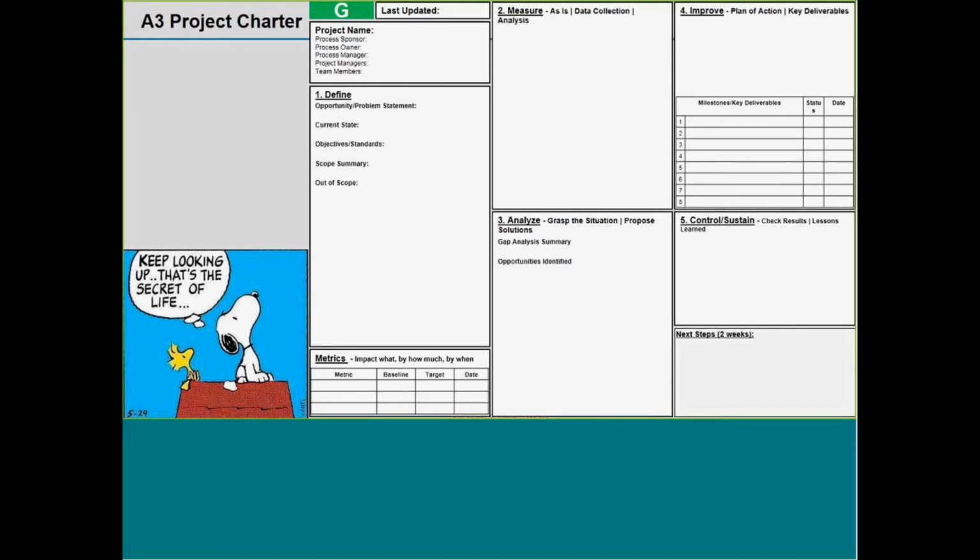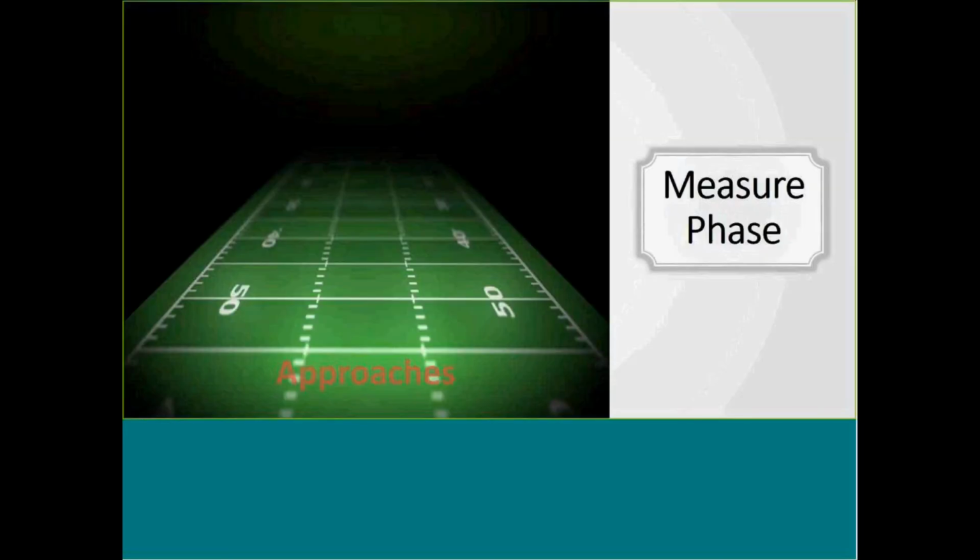It's an important tool. So you fill out your project team members, those important folks working on your project, and their roles. Make sure that you clearly write out your problem statement on your project charter. You can talk a little bit more about the current state if you want to expound on that, but it's also important to include what is in scope for your project and out of scope for your project. Again, critical tools for managing your project going forward.